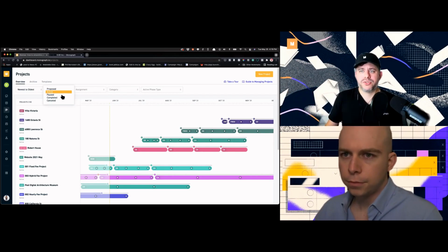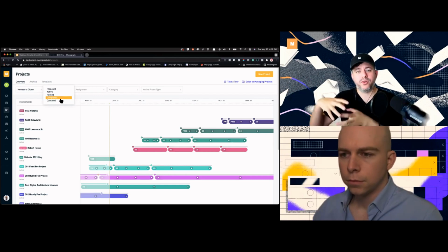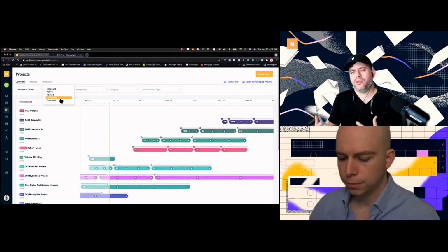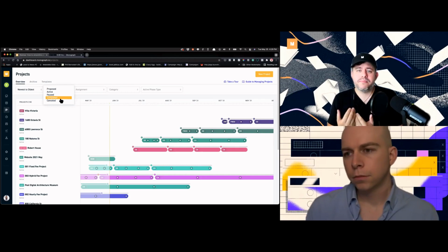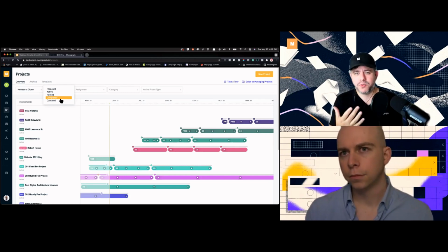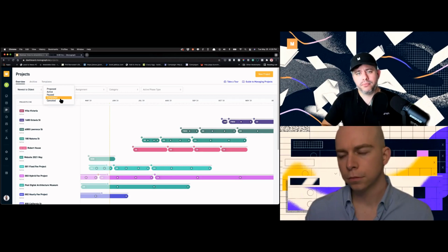But you'll also see here completed and canceled. This will be helpful for downstream reporting, to be able to look at, okay, how many of our projects were actually canceled? How many did we complete? It also has impacts on what you can do from a timesheets perspective. A completed project wouldn't allow additional time to be added to it because it's assumed you've closed it out, as an example.